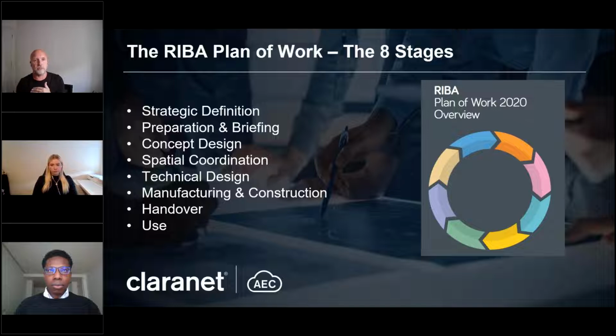They'll start to discuss whether or not there are sites that can actually host the space that they want to build. Is it horizontal footfall or is it vertical footfall? So I think the preparation and briefing is where you really start to pull out things such as the project brief, the employer requirements, the client requirements, the planning permissions, the building regulations that you will require, so that you can then go to either the local authority, the city, the council, to start applying to build that building in that space. And that's when it really starts to become an interesting project.